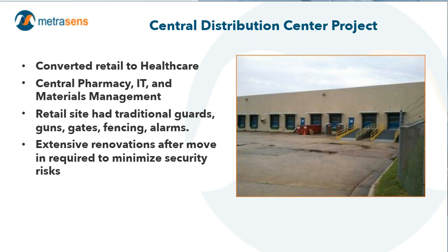Even these roll-up doors were such that if you had a pocket knife, you could cut the vinyl from these roll-up doors. So there was a lot of extensive renovation that was done at this site. And again, it would have been great if we'd had these folks up front, had the information about how to develop and design security-related features into these things up front. It would have been way less expensive had we done it in the first place, because it was extensively renovated after that.